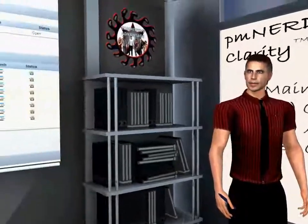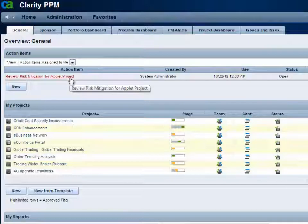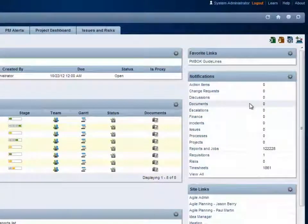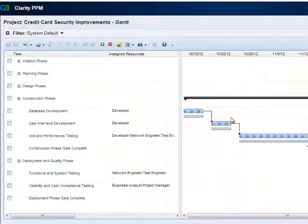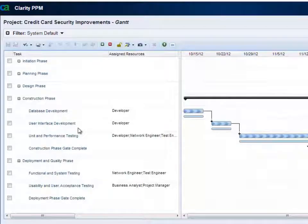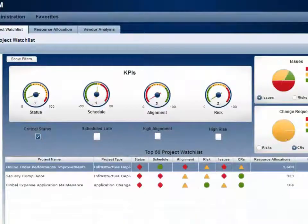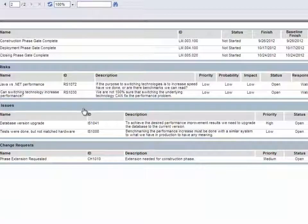Now let's take a look at how Clarity supports collaboration within the COP. The homepage allows each user to collaborate on projects and tasks. You can see any action items assigned to you and update them. Any projects you've been assigned are displayed with their current status and can be drilled into as well. Your notifications are displayed on the right from action items or change requests assigned to you. We can use the project Gantt chart to communicate timing with other team members and see when resources will be needed. Team members can create new tasks or comment on existing tasks by drilling into one. The project watch list dashboard provides status updates for all stakeholders. The status report enables communication of project details to all stakeholders and sponsors. Remember, collaboration begins with a communication plan—otherwise it's just noise and random motion.